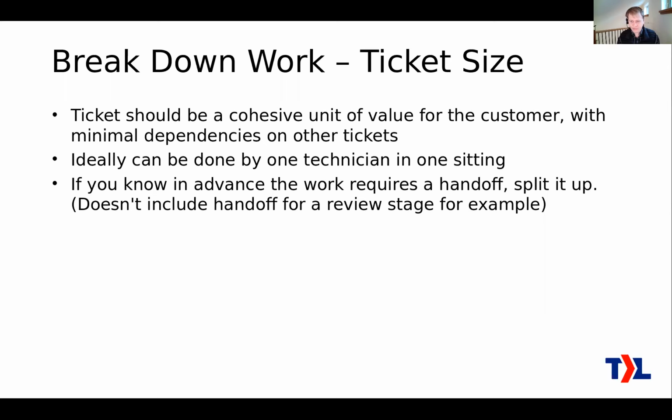If you know in advance the work requires a handoff, then split it up. If you can think, okay, I know that 2 different people have to do some of the work on this, think about if you can actually make that 2 different tickets. Now, if you have a process where the engineer says it's done, and then they put it into a review stage where some other engineer or manager looks at it and says, okay, yes, I agree, this is done, that doesn't count. That's actually a good practice. There's multiple people working on that, but it's not the same thing. It's not the actual work going into it.